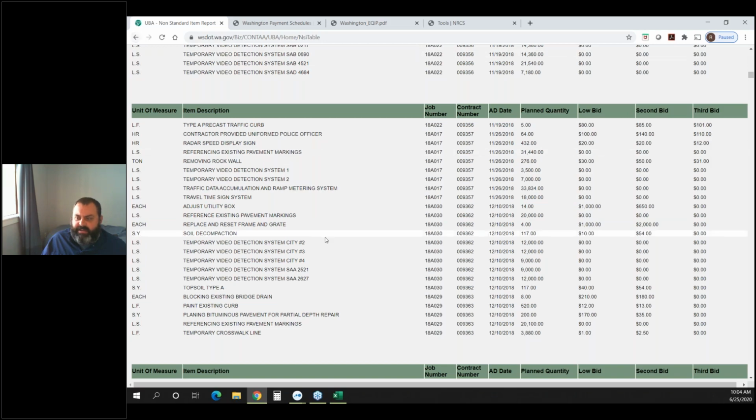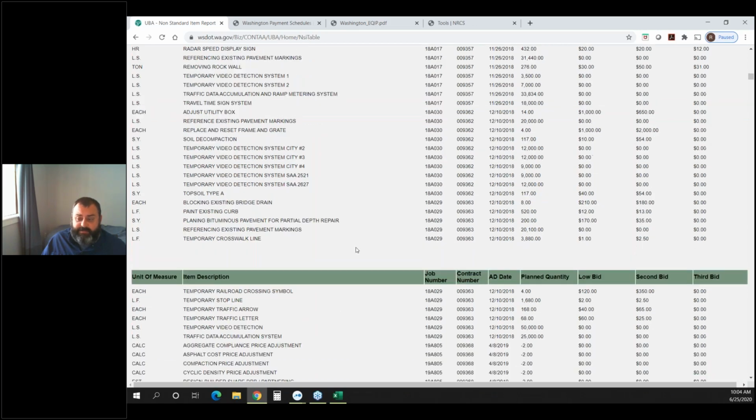So that's one thing. I just kind of use it either to give me a baseline or look at where the world is, at least in terms of public contractors. The thing to remember about this is going to be prevailing wage. It's going to be the more expensive side. So if you're working with a private landowner who's just going to hire it themselves, they're going to be able to get a cheaper deal on everything. And so you have landowners who go, oh yeah, I know a guy, he's my buddy and he'll do it for this much cheaper. And so factoring that into your process is important.